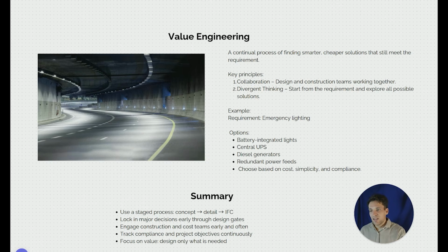The benefit of this is that we lock in major decisions early, everyone agrees to them, and then we add detail later in the design process, which saves design effort but also ensures there's not delays to getting the drawings approved, and the drawings that are approved everyone's happy with.